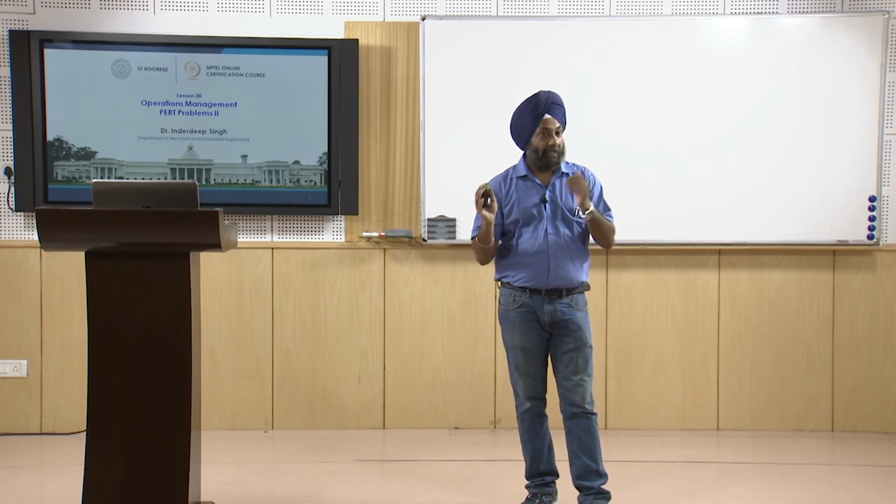So maybe the brand name also gets a beating, and otherwise also you have to incur heavy penalty cost. So why would a company like to delay the delivery of the project, or the overall completion time of the project? None of the companies wants that, and there is the importance of the critical path: the activities lying on the critical path cannot be delayed, otherwise the overall project duration will get delayed. That is the summary that we get from a network.